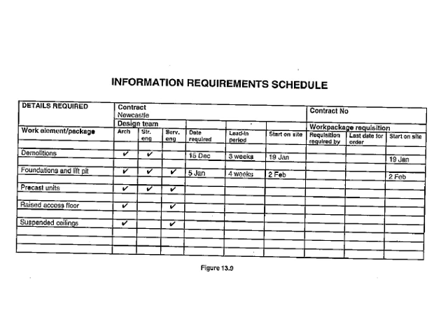Okay, information required. So the next few slides is just an example of your basic request for information. This is just a summary sheet which shows us which items were requested, it was requested from whom, requested on which date, what lead time, when did you give it out, the question, and when you actually received it. Okay, and when you want to start on site. So date required, you require the information by the 15th and start on that date.